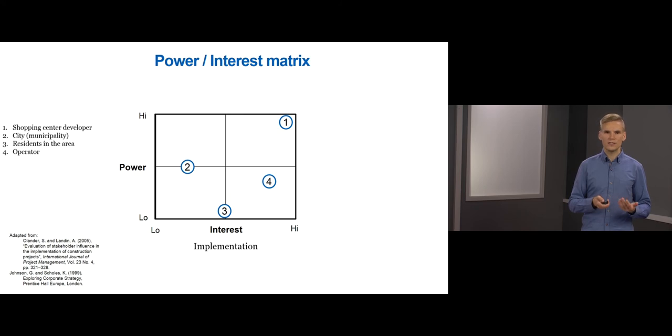In implementation, once the design has been accepted and the town plan is finalized, the shopping center developer gains more power to influence the implementation according to their schedule, budget, and so on. In turn, the municipality is not that interested anymore compared to the design phase, as the town plan has been finalized.